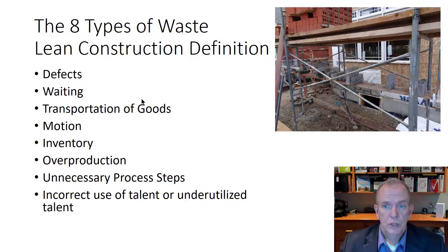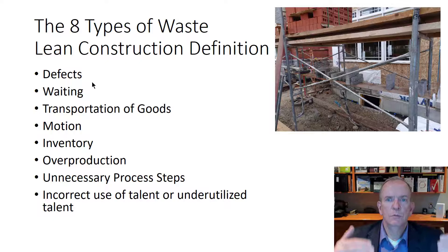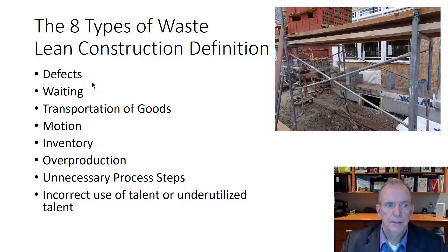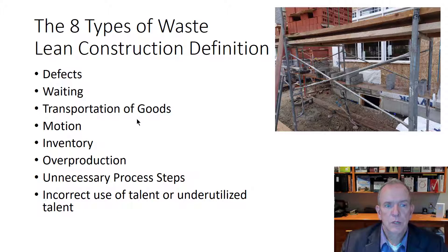Lean construction, which is all about eliminating or reducing waste, defines waste in eight areas — all of which impact productivity. The first is defects. The second is waiting — for example, a crew ready to start but a delivery doesn't arrive, or a preceding trade is behind schedule. Third is transportation of goods: delivering materials too early means they're in the way and may get damaged or stolen; too late and you're waiting.